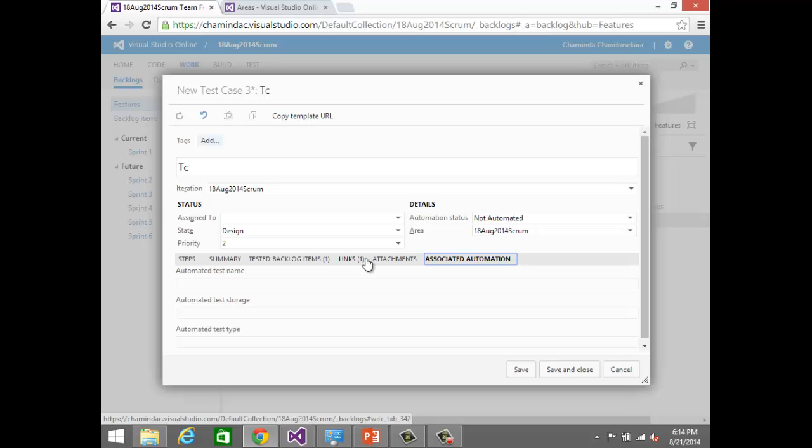Maybe they will not find anything and they will be releasing it to the client even, right? Then the client might find a bug. Now again, that bug should be treated at the user story level, right? But there is a relationship, but we can't activate a closed user story again because it's closed. It has gone through the entire steps of the workflow.